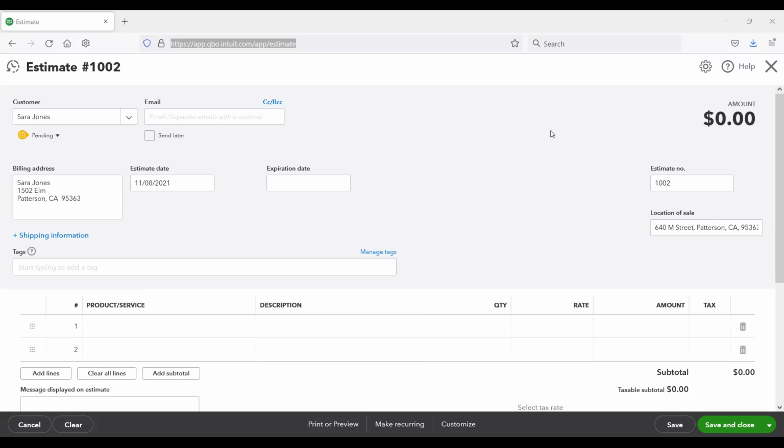So, those prices do change, and what's happening is the vendors and the companies are seeing price changes too. I got it from Costco, and I don't think Costco is just being mean to me and saying, you know what, we're going to take more of your money. I think they have to pay more, so they're passing on the costs, right? So that can happen. And if you have an open-ended estimate, an unscrupulous customer may say, like 6 months from now, hey, you promised me those flashlights for only 50 cents a piece. Well, now I can't afford to do that because they've gone up on my end. So I'd say, no, look at the expiration date. That expired 2 months ago. So it's for a limited time only.